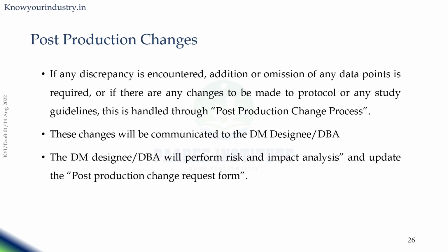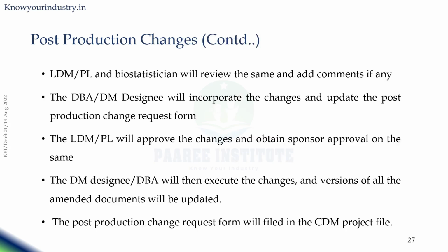These changes will be communicated to the DM team. Then DM will perform a risk and impact analysis, and then they will update the post-production change request form. LDM, PL and biostatistician will review the same and add comments if any. These designees will incorporate the changes and update the post-production change request form. Once it is updated, the same is sent for sponsor approval. Once the sponsor approves the form, then DBA or DM designee will execute the changes and versions of all amended documents will be updated. Certain documents are involved in the process, so those documents also need to be updated.